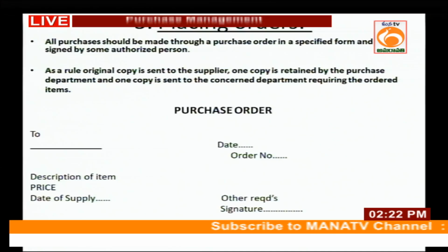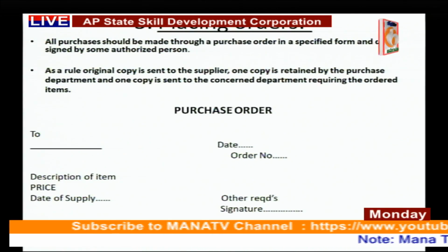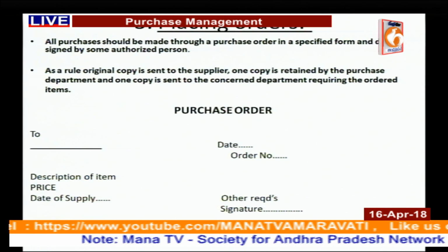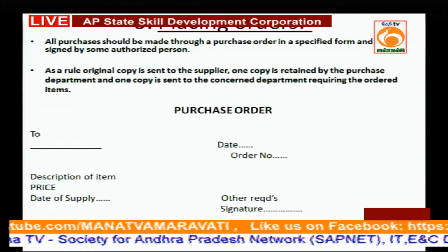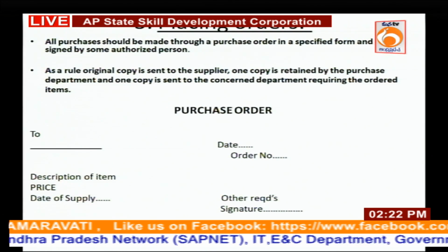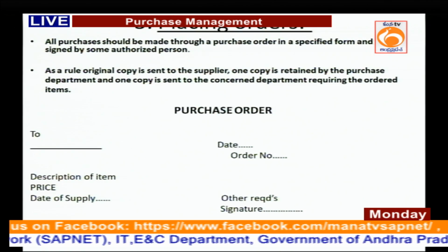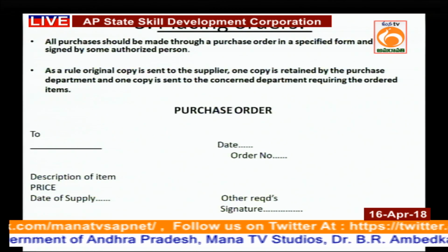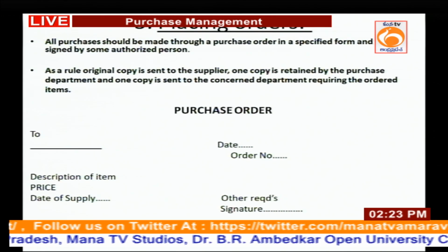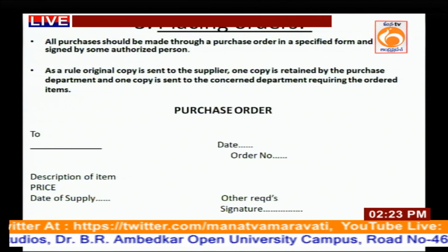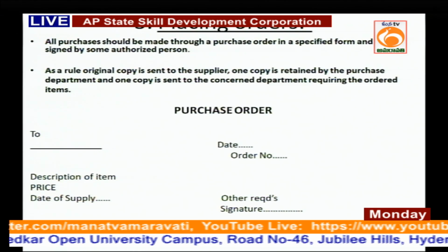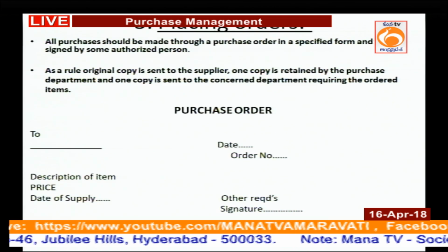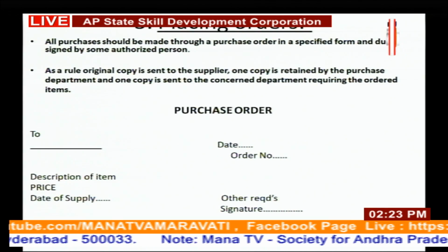Number 3, place the orders once you are satisfied. So, we have all heard, and it is a very common term, purchase order, and this again I repeat, all these formats that I am showing are not sacrosanct. There are purchase orders which are available, different companies use different purchase orders, but basically there are few pieces of information which are available in a purchase order. It is basically the name of the company, the quantity that is required, the time at which the quantity is required, the unit price of those particular products, and other different terms and conditions.